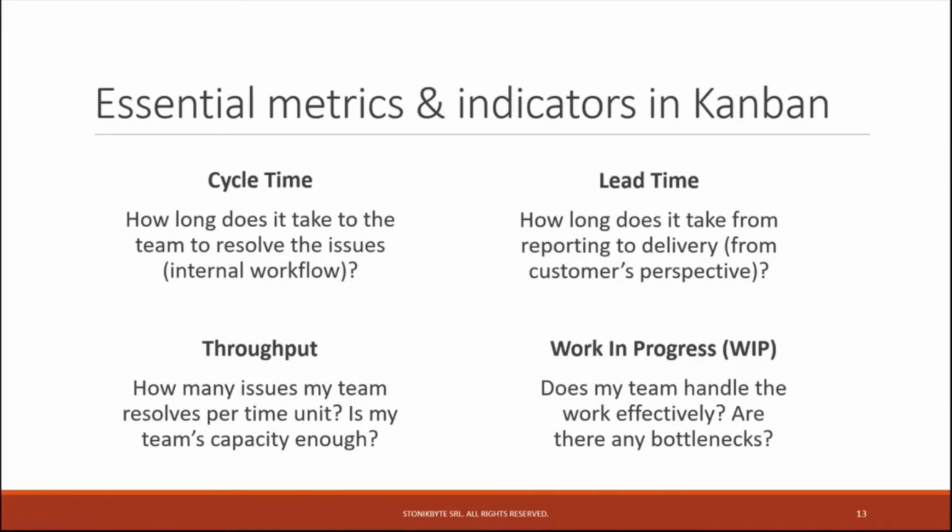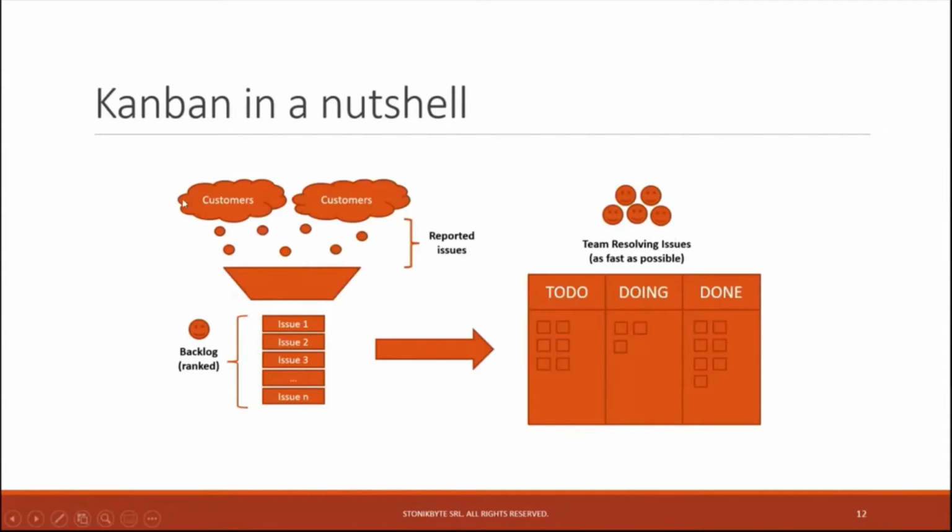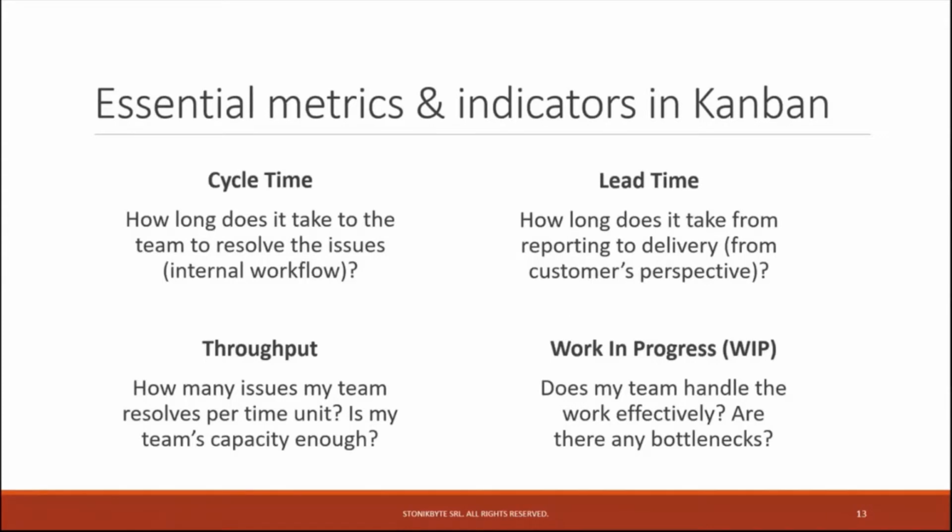Another important metric is the lead time. Lead time indicates how long it takes from reporting to delivery. It is the total time from the customer's perspective. So if I look at this diagram, it is from the moment the customer reported the issue until the issue was moved to done. So it's the whole process time in this case. This is lead time.